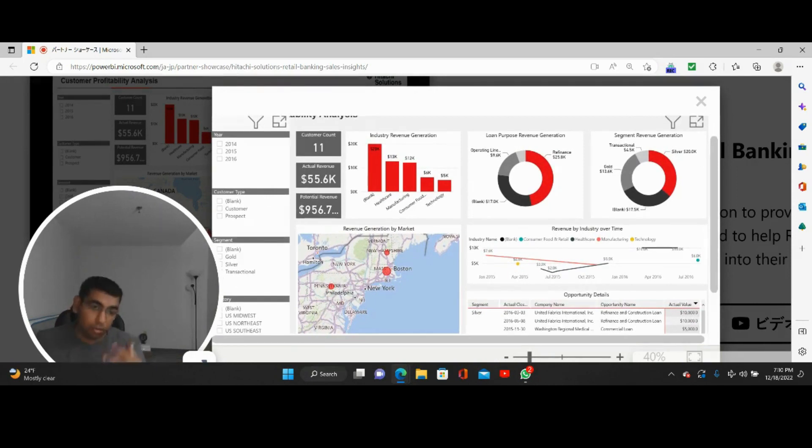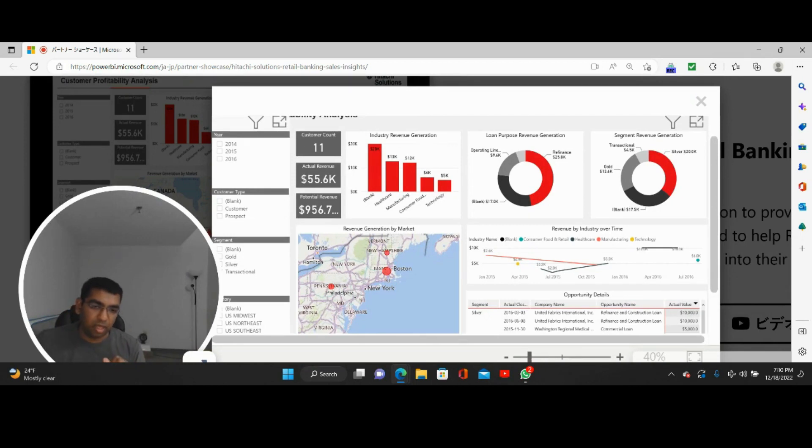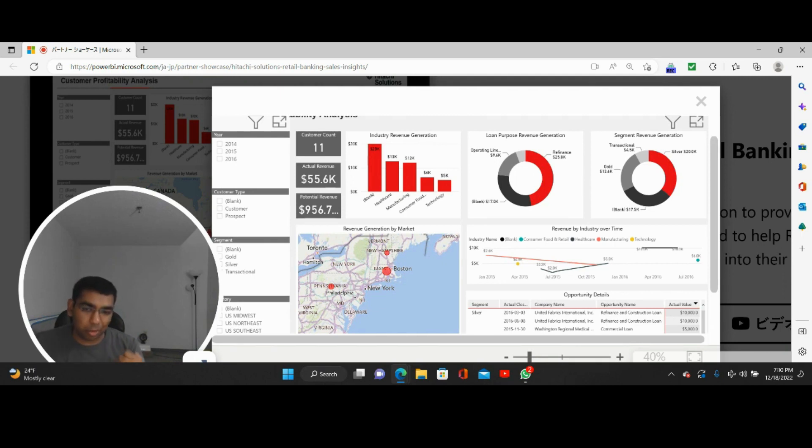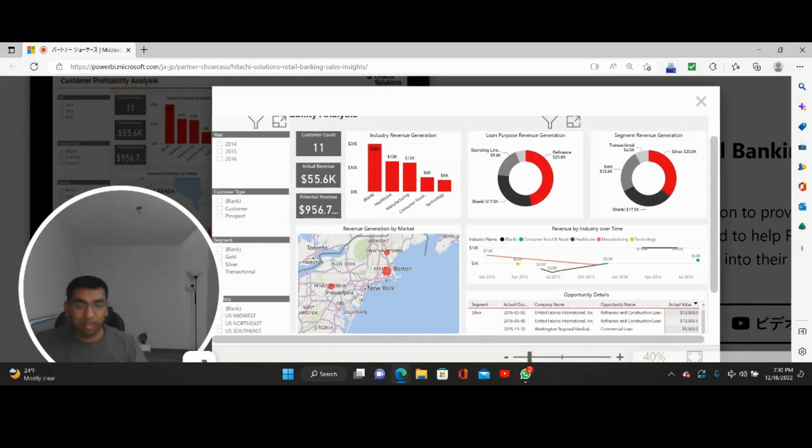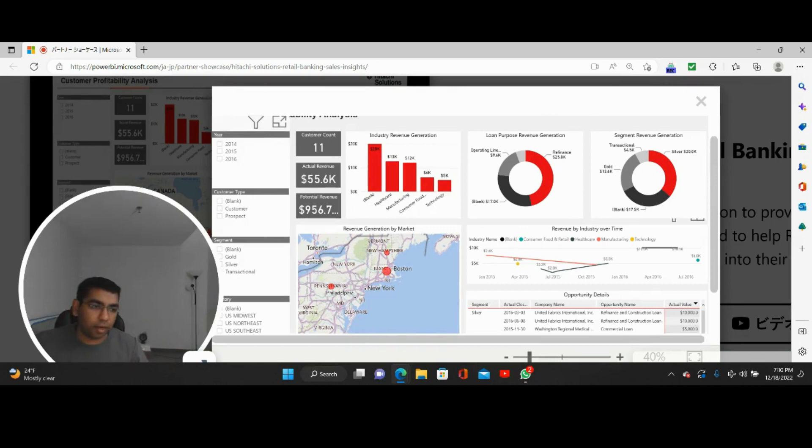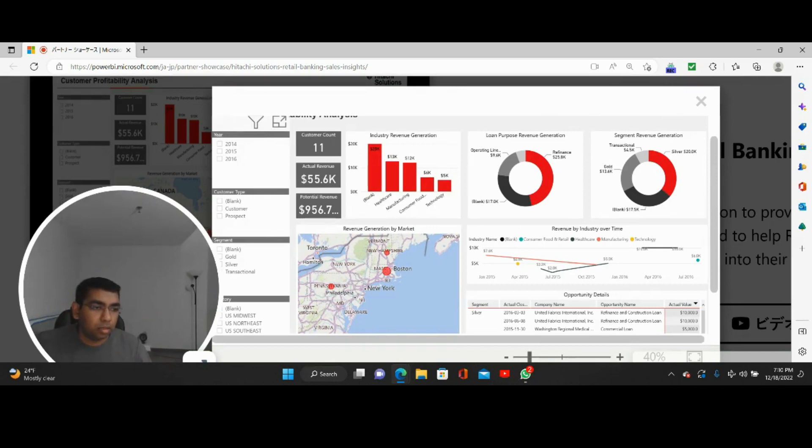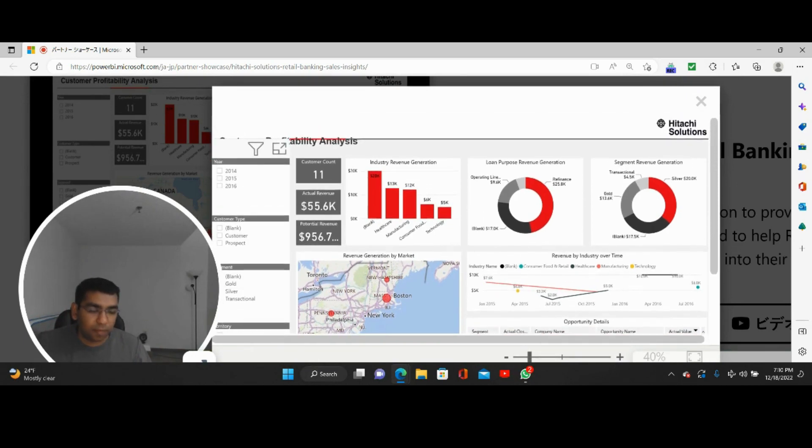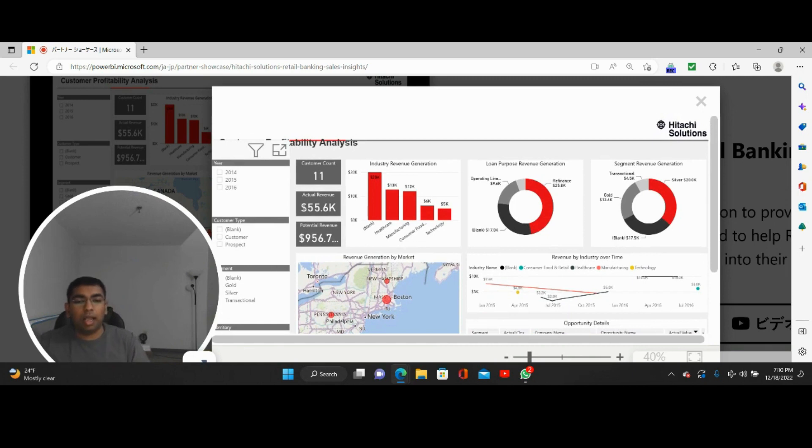Even in Agile, during the sprint review session, we'll only accommodate small change requests. We will not accommodate large change requests or we have to change the entire module, because there's three weeks of work. If at all we are doing that, we have to extend the timeline, extend the scope, so that trifecta comes into the picture—budget, scope, and timeline. So we don't do that. We inculcate change requests provided it is small, and we also get some inputs from the business.